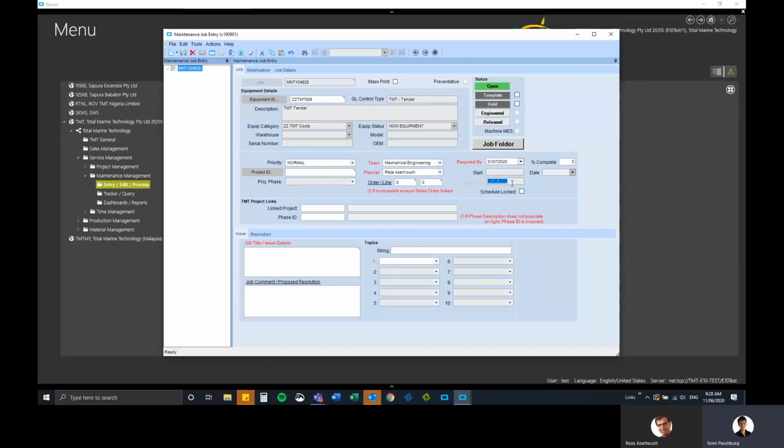So from the start date, if you, for example, put 100 hours of an operation of a given task, that can very well be done in a week. So effectively, between the start and the due date will be, you know, 4 days later, right? So that's why the due date is less important than the required by date. So we're paying more attention to the required by date.